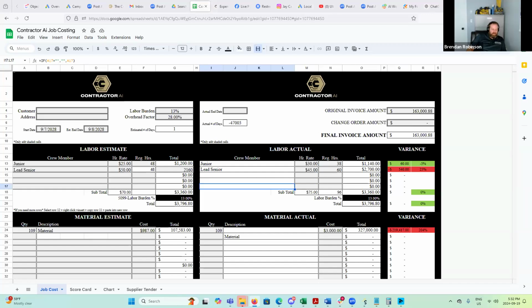You gotta track where the loss was. Tracking the costs. Okay. So again, I'm going to share with you my principle, which is that an estimate to production should have no more than a 2% variance either way. Meaning anything outside of 2% loss or gain is something to be concerned about. And what I mean by that is when you really get good at this, you can call your shots. It makes everything else that you're doing make sense. But until you can do that, you're not going to be running a stable business. It's going to be very hard.